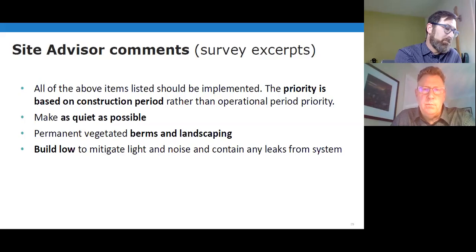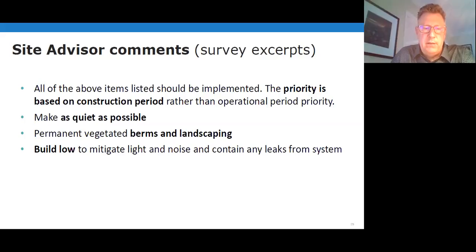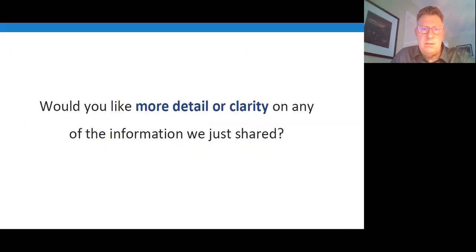I don't know. At this point, we have a contractor coming on who's in the capacity of a CMGC contracting method. In other words, we're going to get the construction manager before we get the general contractor, which is the way this kind of project should go. So we have the opportunity to discuss design ideas earlier in the design.